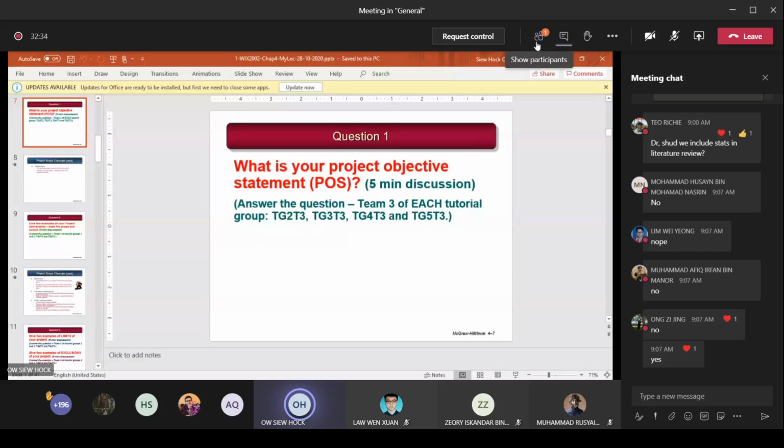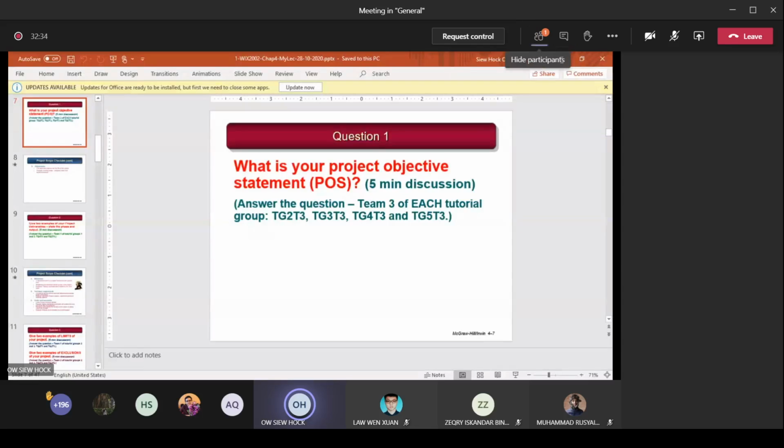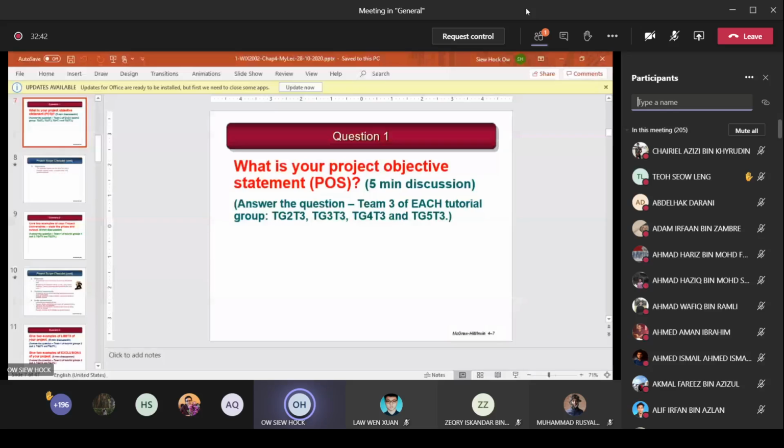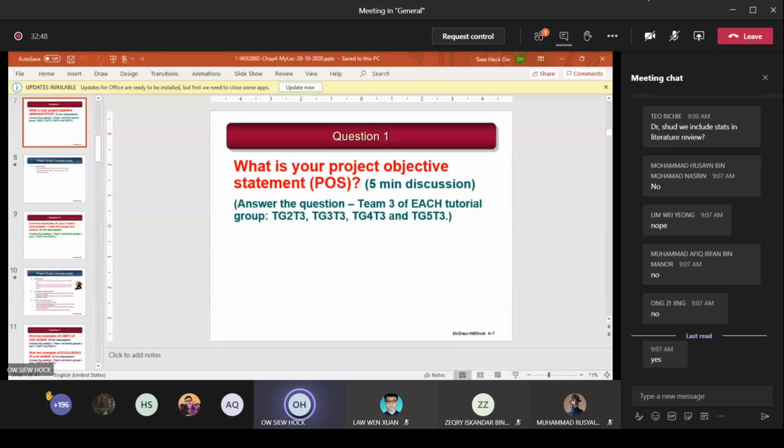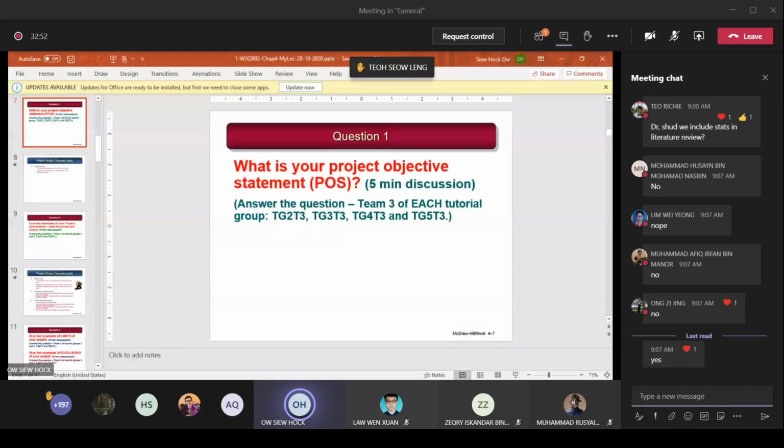Last one, you mentioned the cost. How much? You put about 1,000 to 2,000. That's a range. So again, state the how much in a very specific way, a specific amount. Let's say the budget for 2020 is 10,000. Then it must say not exceeding 10,000. That means the maximum amount it will cost me is 10,000. So you have to give a specific amount, again specific.